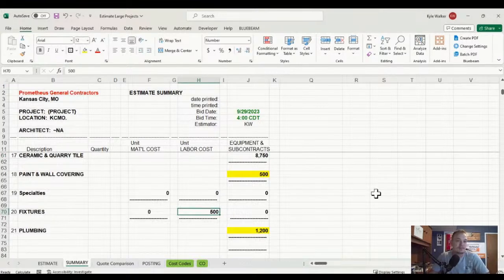If I'm doing your bathroom floor and I have to pull the toilet and remove a vanity or move stuff or whatever, then that's what that cost would be. You know, a lot of guys, they figure daily rates. That's just a common way of bidding projects nowadays. It's not right, wrong, or indifferent. It used to all be an hourly thing. Now it's pretty well a daily rate, because if I come to your house and I plan on working a full day, but you ordered the tile, you didn't order enough, and I can only work a half a day, I'm still charging you a full day for my crew.